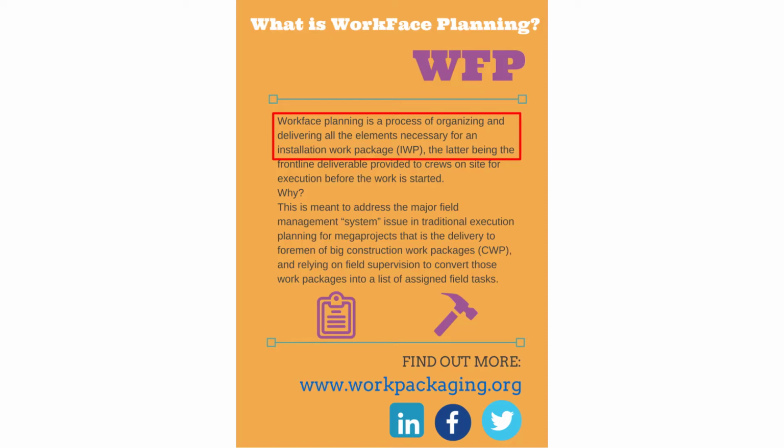I believe, if I remember correctly, they're talking about between 8 and 10 days worth of work for an installation work package. And so they chunk the project down into smaller pieces, and then they do detailed planning on that as far as material, safety, equipment, tool needs, labor, and they put this whole package together, a detailed package to deliver to the crew to say, this is your responsibility on this project, and here's all the information that you need to execute it.